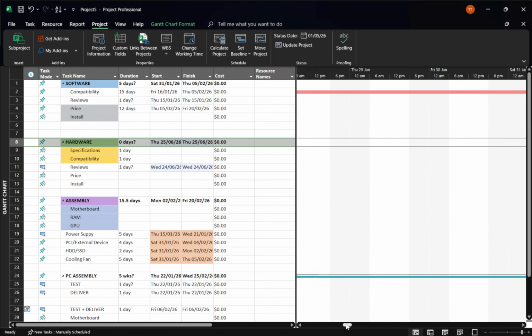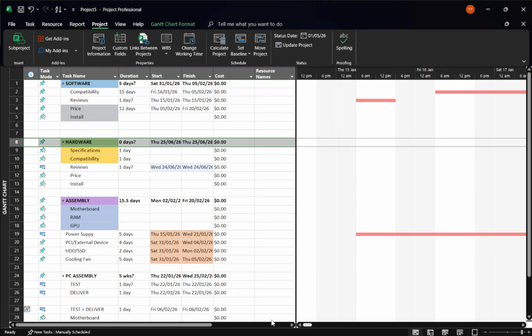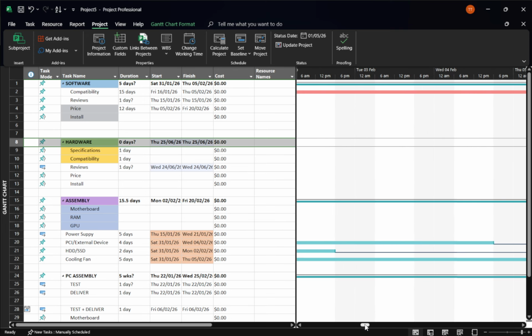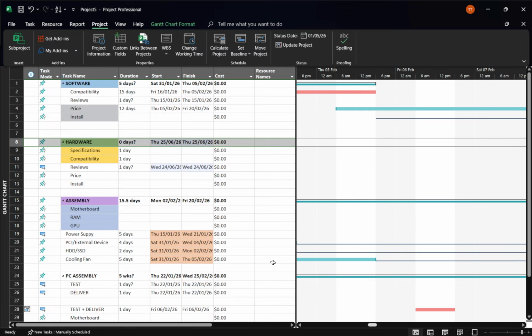Behind the scenes, Mark on Track updates the percent complete field and aligns each selected task's progress with your schedule through the status date you set. It assumes the work has been happening as planned. No delays, no acceleration, just exactly on schedule. In other words, you're telling Project, this task is exactly where it should be today.